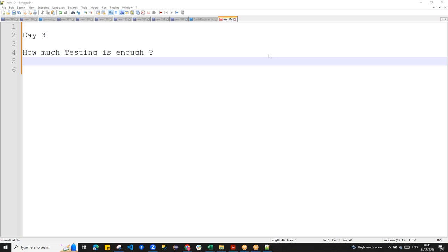Okay, so again, going back to the main point, when is the testing enough? You will have a test strategy and the planning to make it done, and that means you write enough test cases, like 100 or 200 test cases, and do exploratory testing, where with domain knowledge you do some testing without scripted cases, and then you will give a sign off. That's where we will stop testing. But all this testing is happening to ensure that it is useful to the business, right, to clients. Otherwise, if they cannot use it after all your testing, that's a blunder, right?